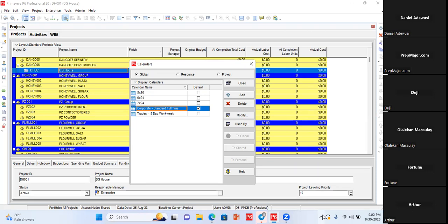Now we have tasks of 6 days left. And I am the only one available. So because it takes 2 people to work on a task, that's 6 times 2 because I will have to work 2 days to finish 1 task. So that means 12 days plus 4 days that myself and Omolola has worked. And that makes 16 days altogether. Thank you. That's brilliant. That's what I want to hear.